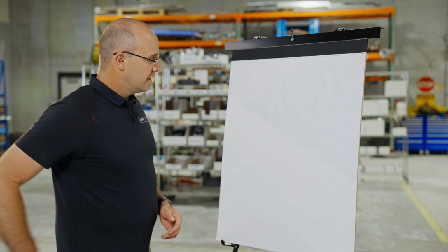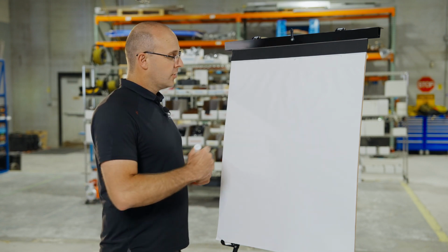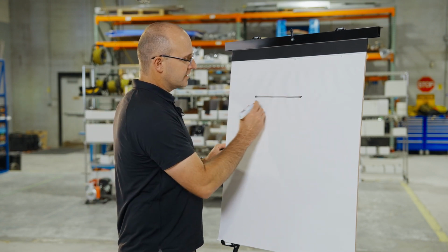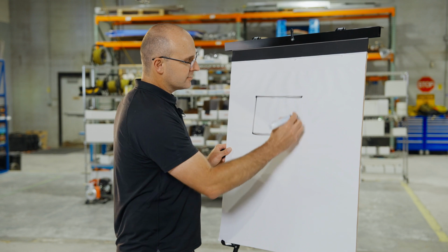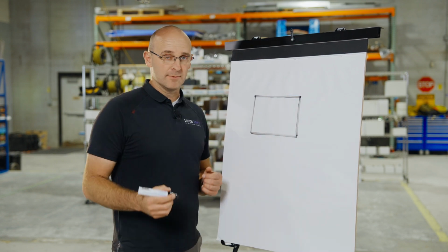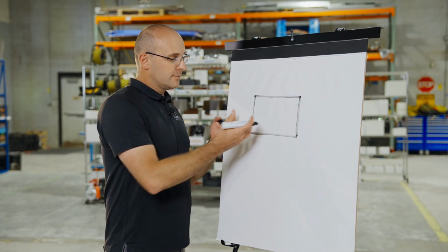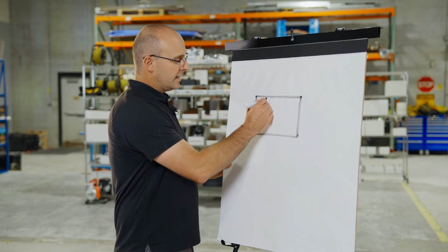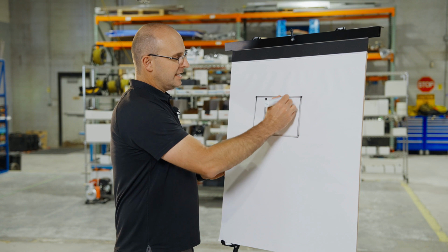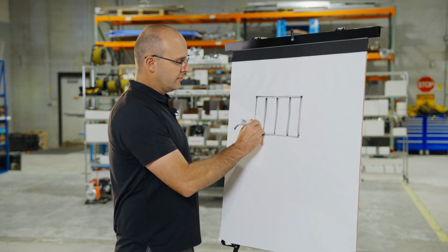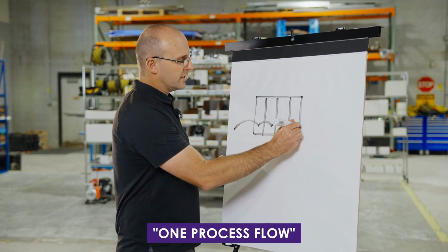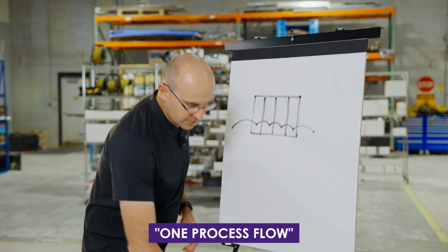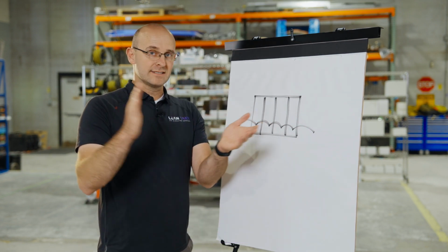When you as a trade partner are going through the project, and let's just take a 40,000 square foot floor for an example, instead of throwing somebody into that area and pushing you to get done, we break up the floor into key zones and trades move through this in what's called one process flow according to, like I said, that takt time.